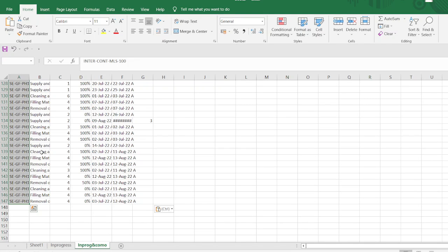Then we see that this will show you 146 activities. Why is it showing 146 activities? Because some activities, as per the condition, are out of sequence, and the reason is that it is the effect of the predecessor activities, which is going to the successor activities. So that's why our filter shows you more activities. In fact, it is less. So let's try to fix this.